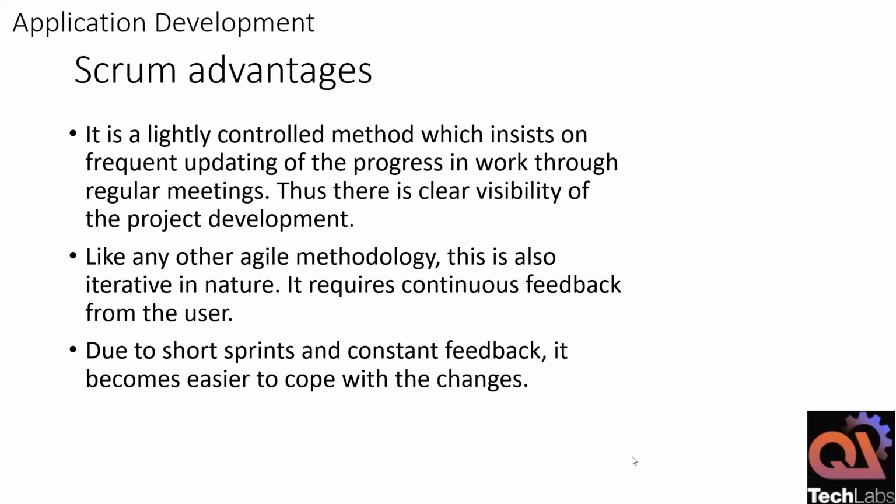So you always need to understand your scope, your time, and cost. Whenever it comes to any methodology, you need to take STC as your parameter, right? So here in Agile, you will be able to define your scope, but the time will be fixed, right? Because you have to deliver within the 2 week or 3 week interval. And every week, based on your org funding, you will have the cost you will be able to consume. Based on that, you will be able to allocate 2 or 4 or 5 people required for that particular project, right?